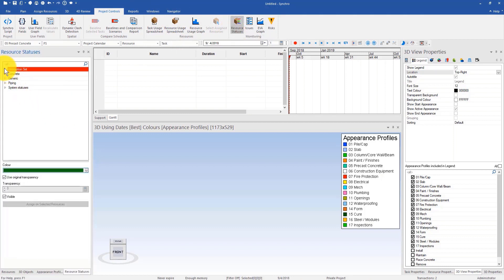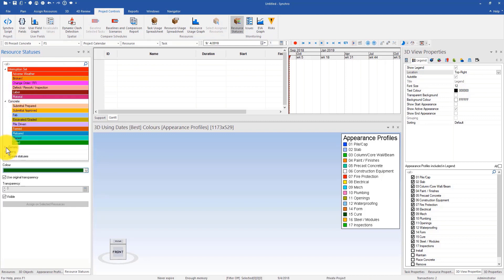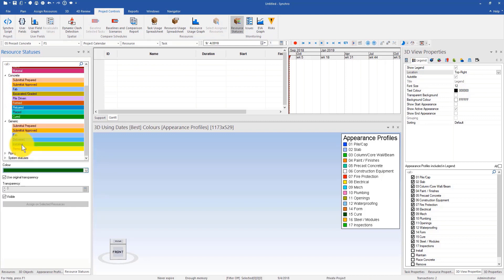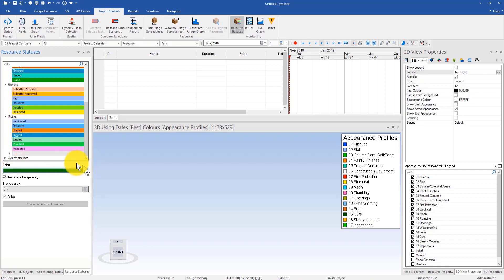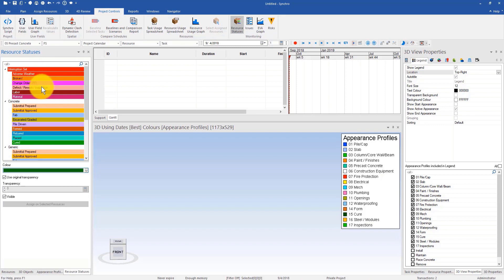If I go to project controls or navigator, you'll find the resource status icon. That'll turn on the additional window that I need for resource status. You can see I have different color sets for resource status that have been set up and imported. For interruption sets we have different colors set up to say this resource or object will be delayed due to certain reasons such as broken, change order, RFI, defect, rework, inspection, etc.